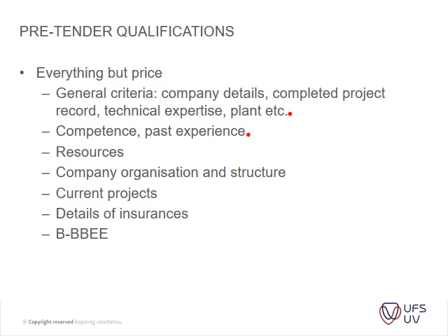You have to have reference letters or completion certificates of previous work that you have done. So it can be difficult to build up that references. Okay, then obviously what resources you're going to use, which people, what their qualifications are, your company organization and structure, current projects that you're busy with, do you have capacity to do that, details of insurance, etc.